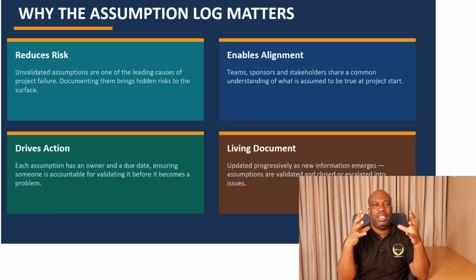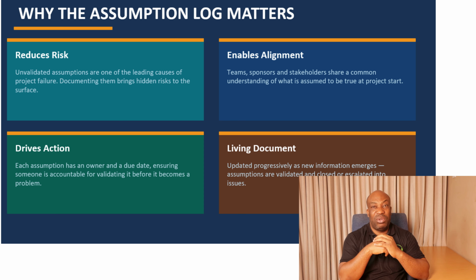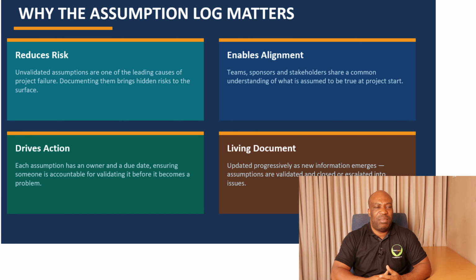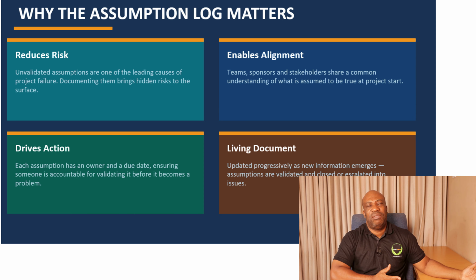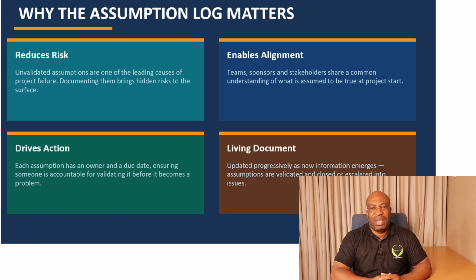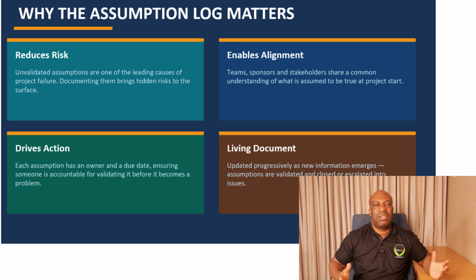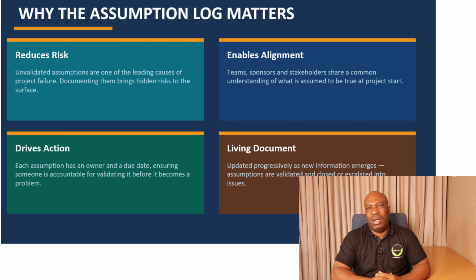Then, especially during the initiation stage, where you're creating probably a project charter, or you're identifying some stakeholders, it's also very important to use assumptions for alignment, because the organization's senior management or program managers or portfolio managers want to appreciate what was the basis of your estimates, what was the basis of your documentation, what was the basis of your requirements collection, as an example. So the assumption log can also be used for alignment.